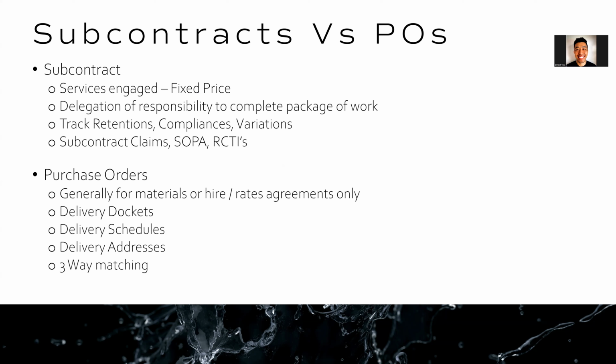So a subcontract relates to services engaged. But the key thing with subcontracts in Premiere is that you can push a subcontract through the portal, and that allows your subcontractor to claim through the portal. So it has a predefined set of behaviors attached to it. You can track compliances, there are subcontract variations, all that kind of stuff. All of those behaviors are linked to subcontracts in Premiere. So if you're raising a subcontract in Premiere, you have access to all these features.